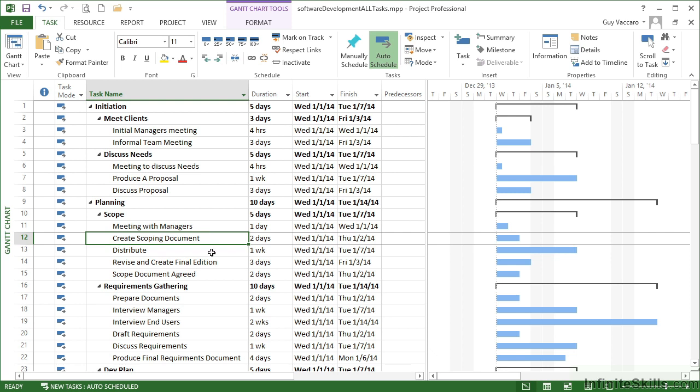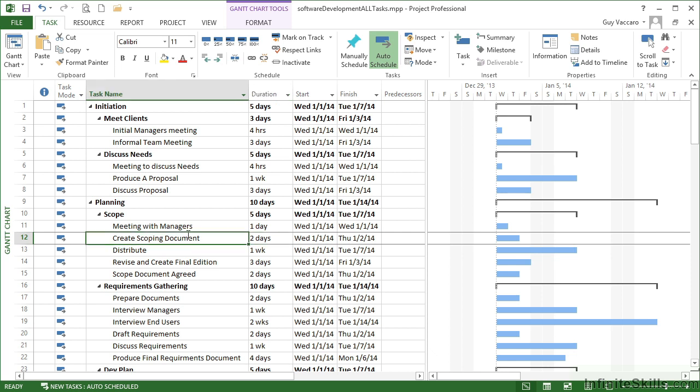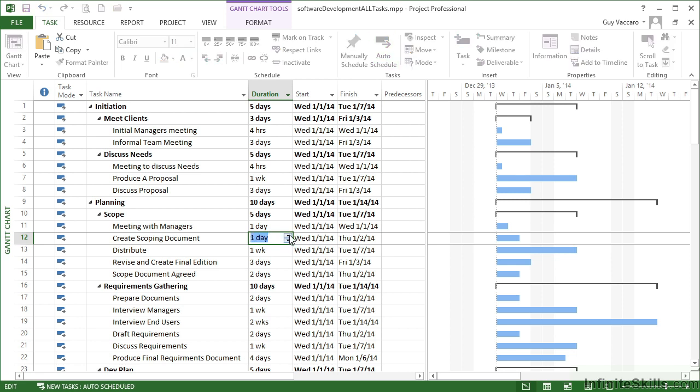The first step if we want to edit is to simply pick on a task such as this one here, create scoping document, and it may be that we wish to edit either the duration or the task name. If I wish to edit the duration, I can simply click on the duration and either use the little up and down arrow here, and that will amend the actual number of days for this particular task.